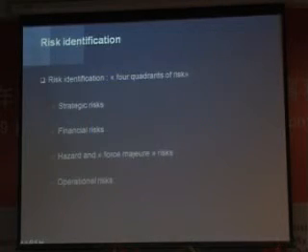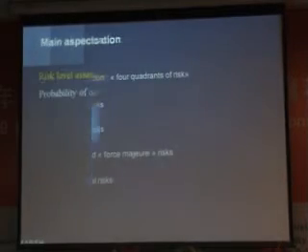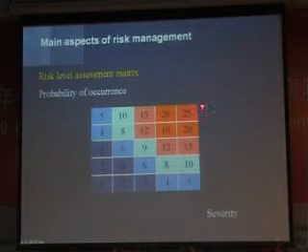It's the same thing for occurrence and severity. And if we arrive in this area, which is red or orange, between 12 points and 25 points, we have a very bad risk and we have to treat this risk. As the opposite, if we have a risk between 2 and 4, maybe 6, we can accept this risk because the risk is, in this case, acceptable.